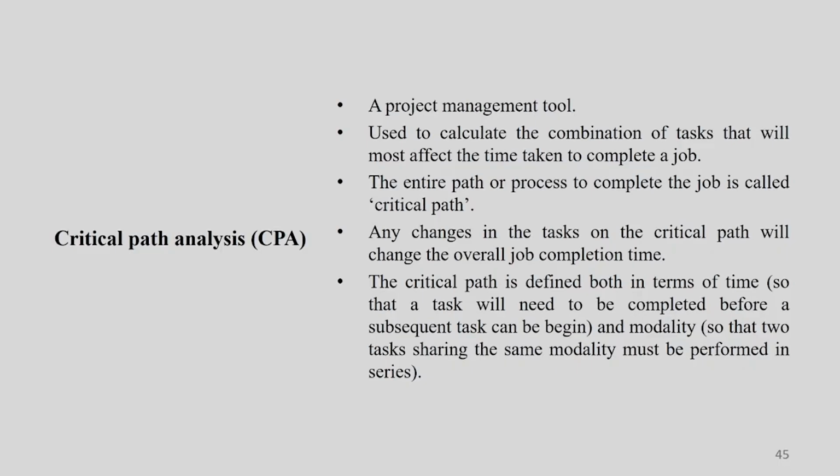So we need to understand that the time taken for task 1 needs to be within a particular period of time. Now if we see after the critical path analysis that task 1 is not possible to complete within this much time, then we have to do some kind of intervention so that task 2 can start on time. This is the way how we use time.